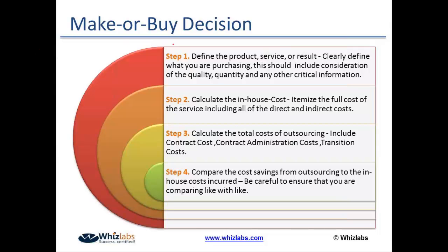How? Step one, we define the product that we are actually supposed to generate. We calculate the total in-house cost. We calculate the total cost of outsourcing. Then we simply compare apples with apples to find out which is more beneficial. Is it beneficial to do it in-house or to outsource it? In a nutshell, that is a make versus buy decision.